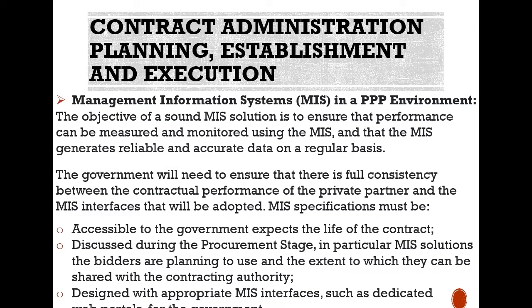Management Information Systems (MIS) in a PPP environment. The objective of a sound MIS solution is to ensure that performance can be measured and monitored using the MIS process and that the MIS generates reliable and accurate data on a regular basis. The government would need to ensure that there is full consistency between the contractual performance of the private partner and the MIS interfaces that will be adopted. MIS specifications must be accessible to the government throughout the life of the contract, and MIS solutions discussed during the procurement stage, including dedicated web portals for the government.